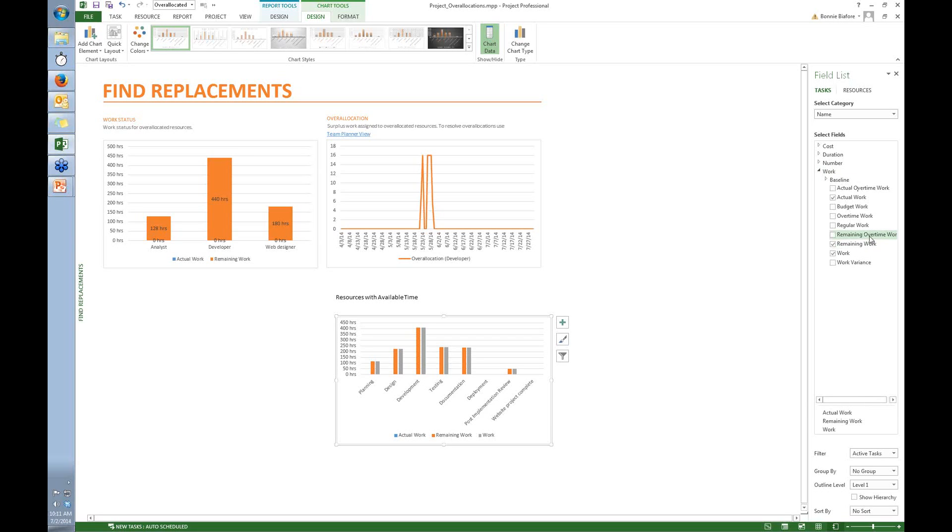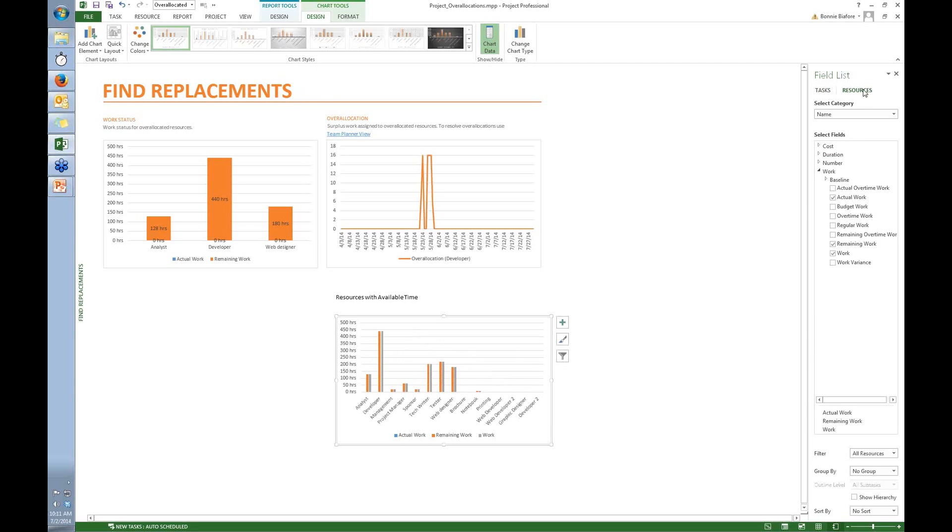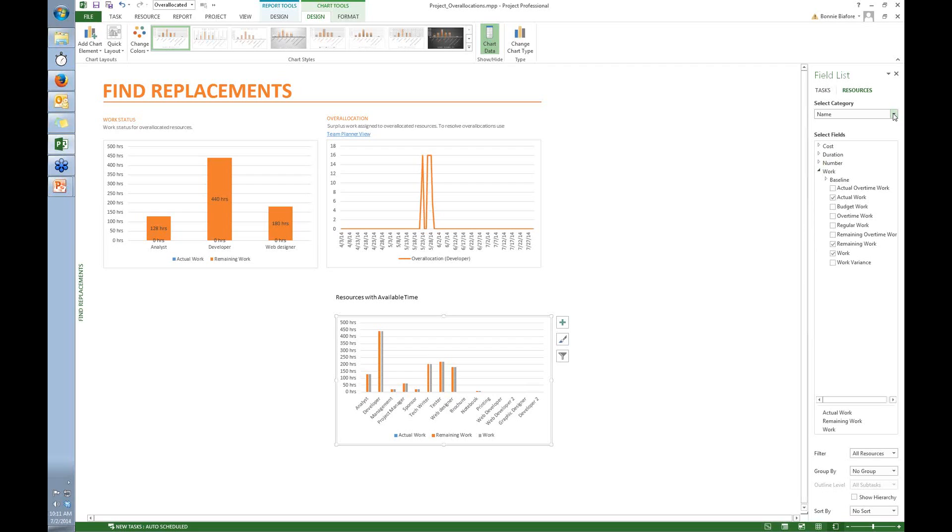By the title, I want it to show resources with available time. So the first thing I'm going to do is go over to this pane on the right side. The first thing I want is I want this chart to be resource-based, not task-based. So I click Resources up at the top. And now you can see instead of tasks along the x-axis, I've got resources.